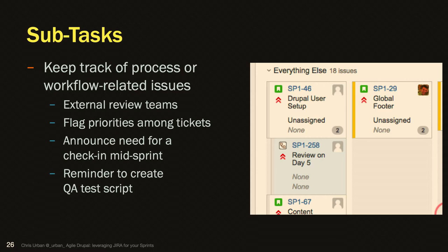We are maintaining a platform, so a lot of times you can't release the back end without the front end. Customers are already using it. Well, then you get into feature branching. You probably have a lot of associated tickets together and can only release them all at once. You're going to do a feature branch release and maintain two or more tracks at the same time. But that gets into the swim lanes and the query construction, the need for teams and labels and custom fields, because now you're using a fixed version. Fun stuff.